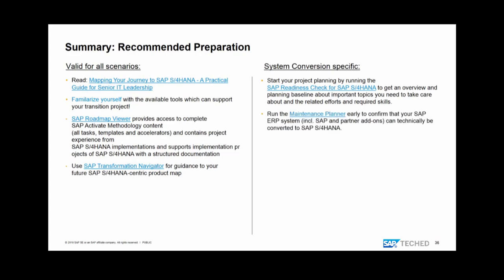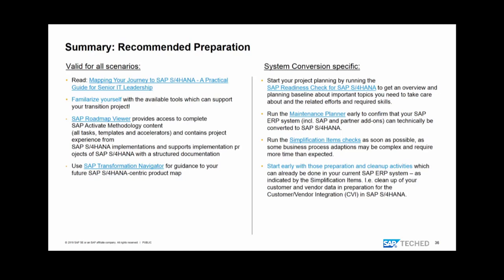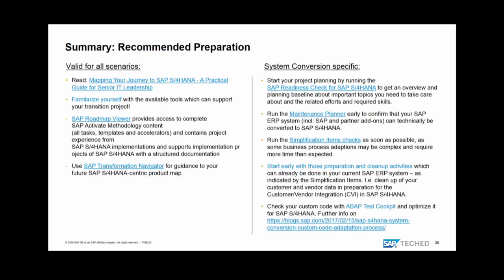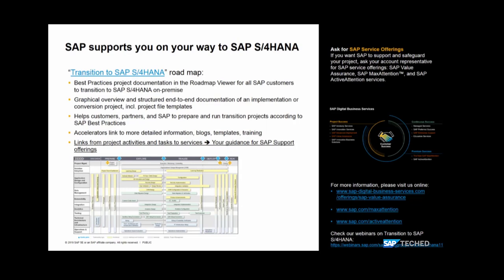For system conversion specifically: start your project planning by running the SAP Readiness Check early — it covers all areas requiring action, especially add-ons and other topics. Validate your project planning based on the findings. Run the Maintenance Planner to confirm your SAP system is ready and can be converted with a consistent software stack successor. Start the simplification item check as soon as possible because some business process adaptations — like Customer/Vendor Integration and migration to Business Partner — are very time-consuming. The earlier you identify and act on them, the easier it is to keep your timelines.